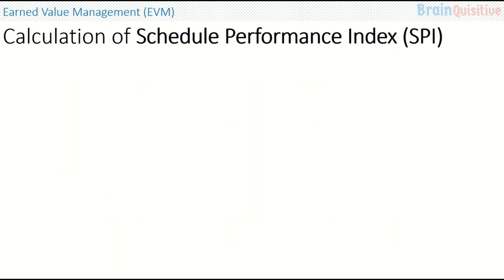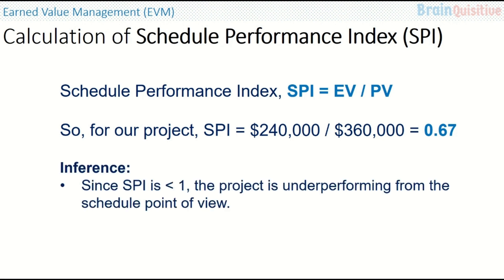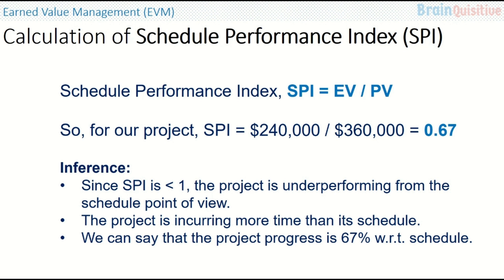Now, what is the Schedule Performance Index, or SPI? This is EV divided by PV. For our case, it is 240,000 divided by 360,000, which is 0.67. Since this is less than 1, the project is underperforming from the schedule point of view as well. If it is equal to 1 then it is on track, and if it is greater than 1 then the project is ahead of schedule. In this case the project is incurring more time than its schedule, so it is behind schedule. We can say the project progress is 67% with respect to the schedule.